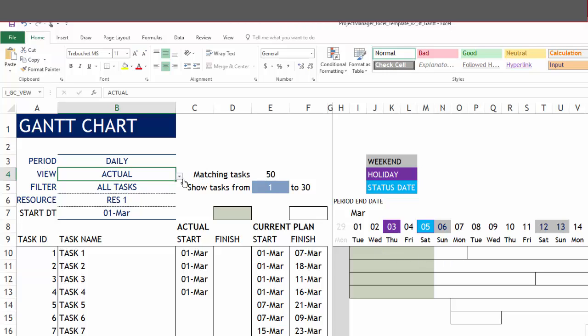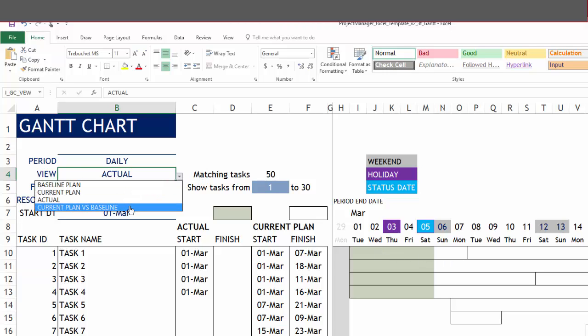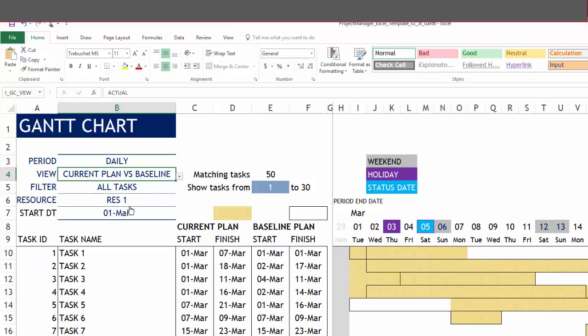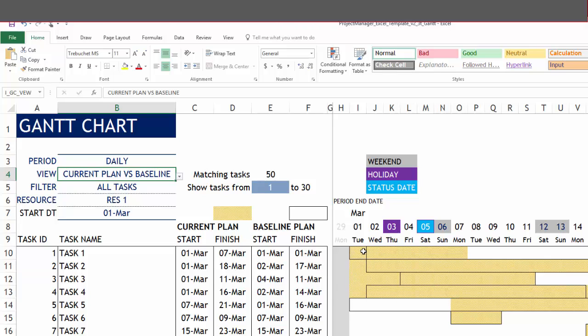The last view is the current plan versus baseline. Here we will see both the current plan start and finish and the baseline plan. The baseline plan is in white and the current plan is in the yellow pattern.